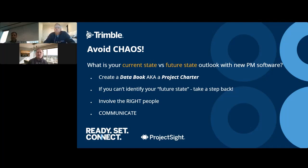Advocate for enough time for data migration, testing, and training — you have to think about that upfront. Otherwise, you'll be targeting a go-live date, it'll arrive, and the organization won't be ready. You'll rush it and could see your entire implementation fail. Whatever time you're thinking about for testing, double it. A smooth user experience as the first step is a major win, and bad data will cause people to complain fast — chaos will quickly ensue.